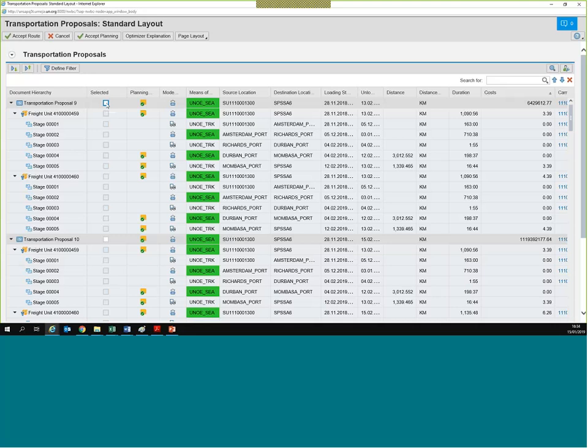So the idea of all this is to compare what we're calculating with the actual, so that the UN can eventually save money on transportation. That was basically what Babacar was trying to communicate, and that's the reason behind having the estimates before even having the actual information from the freight forwarders. I hope that helps in understanding why we're doing this.